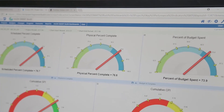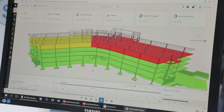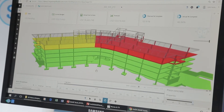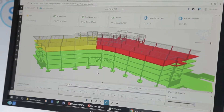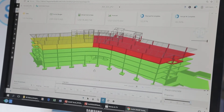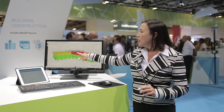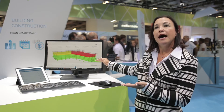Also unique is the ability to drill into any level of detail, so we can tell exactly why a slab is red. For example, we can drill into a work package, which is how we connect together all three of those elements — the model, the cost, and the schedule.